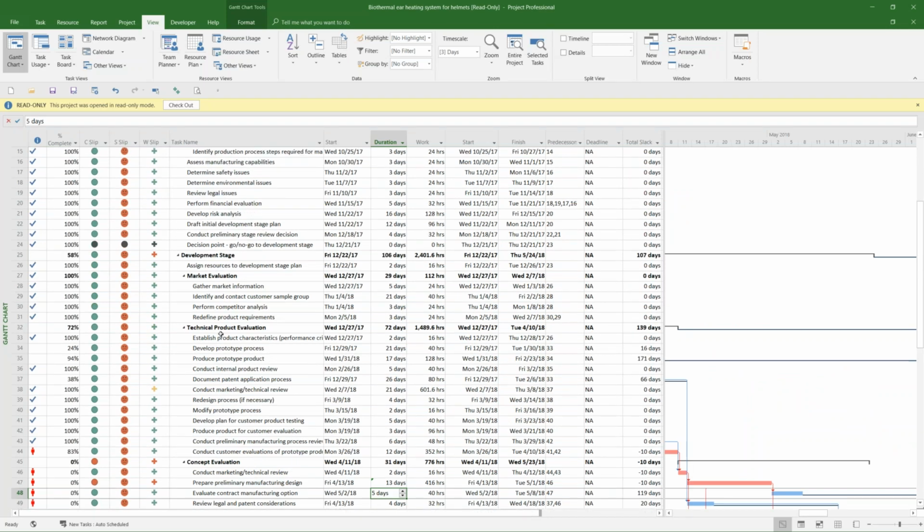It's definitely relative to the overall project, but the goal is that you want to be able to easily present the status of a task to somebody who is either looking at your project schedule or receiving your status reports. So if you've got a task that is, for example, multiple weeks long, it's very difficult to tell whether that task is on schedule or off schedule from looking at a duration of a task that maybe has 2 more weeks to run.